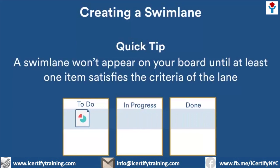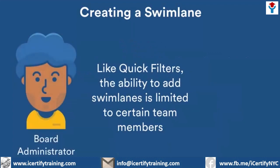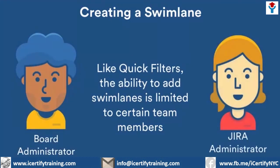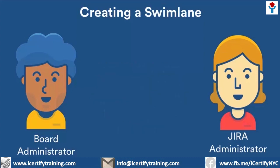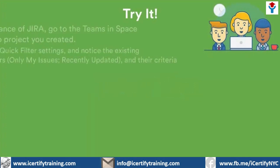Creating swim lanes is also a restricted operation. Like quick filters, it's the board administrator or Jira administrator that creates swim lanes. Because everyone who uses the board sees the same swim lanes, only swim lanes that are useful for the entire team should be added — and that's effectively enforced by restricting the ability to create them. Take some time to apply what you've learned in your own project.